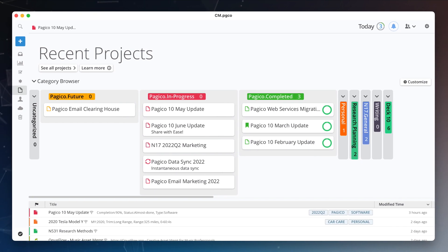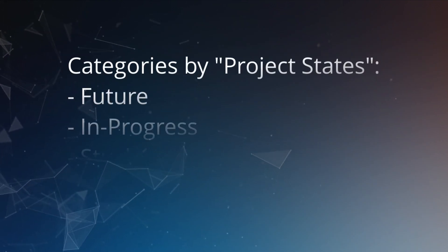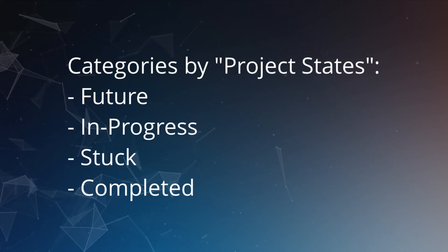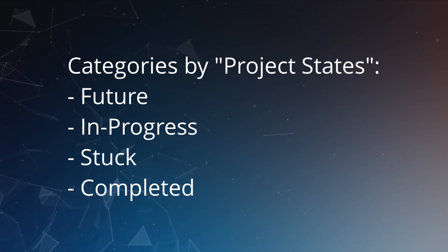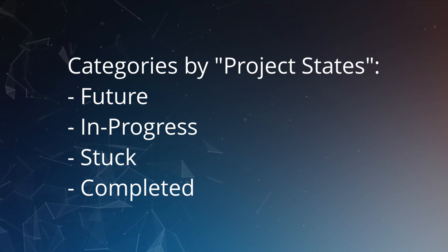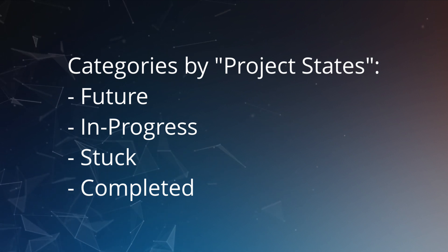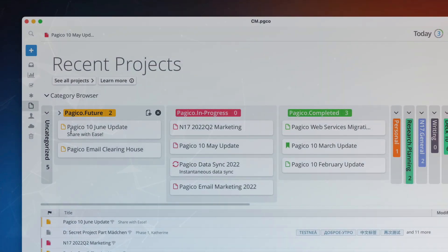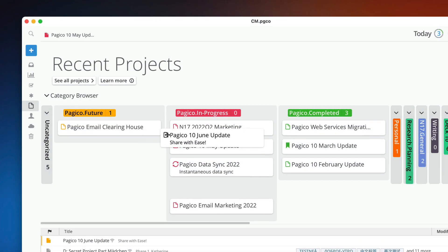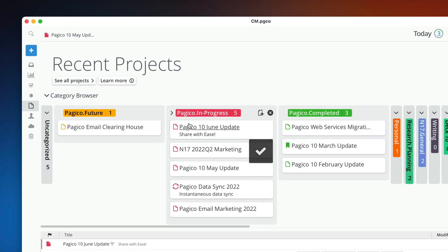For example, create state categories such as future, in progress, stuck, and completed. Then put your projects and move them through these states as they progress. When things are behind or stuck, put them in the stuck column. When things are done, move them to the completed column.